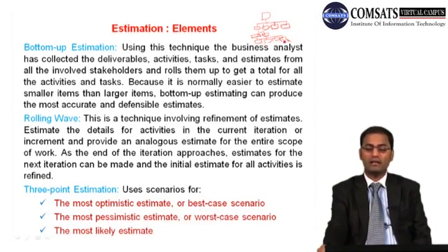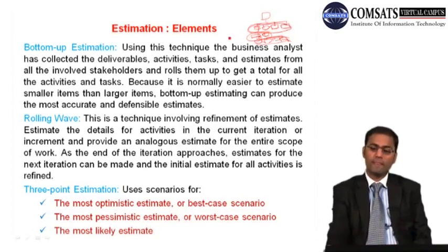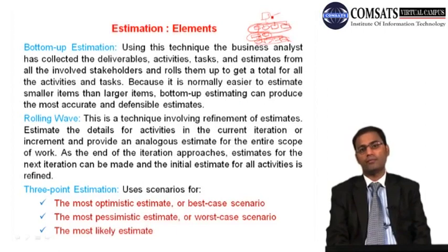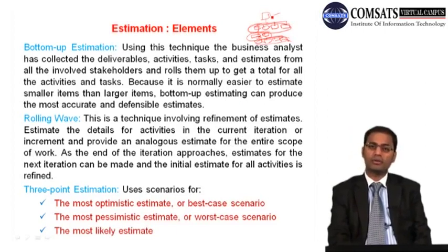and understandable. Then we sum up the cost of these activities, and then we sum up the cost of work elements, and hence we sum up the cost of these work packages, and then we get the cost of a project. So this is bottom-up estimation. We go as low as possible and as practical, and hence we can have the prices of the larger items, and hence the project or initiative.